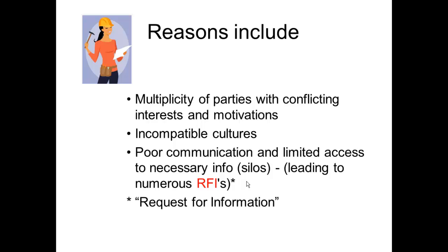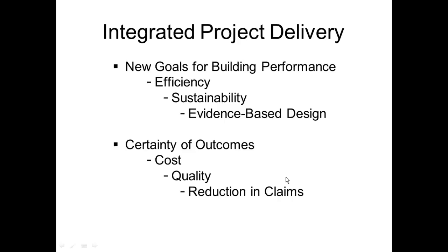Do you want this, or do you want this? Which one is it? This one's going to cost X amount of dollars. This one's going to cost this amount of dollars. I only carried the lower price one. If you want the more expensive one, we're going to have to issue a change order. It all becomes an issue of communication.